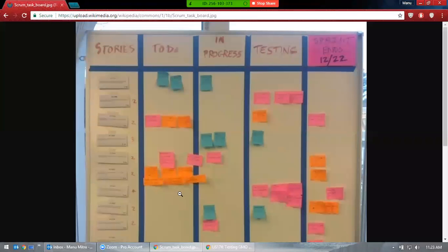And then to do is how much work you have to do. Let's say we discussed in this meeting 5 days for each task. You put the number 5, and as each day passes, you cross that number and put 4. Or no, it's 2.5 days, I worked only half of that, and the remaining half I was working on a different user story. That's how you organize it. Normally you put a sticky note here, blue color for developers, pink color for testers, something like that, and you put it in progress.